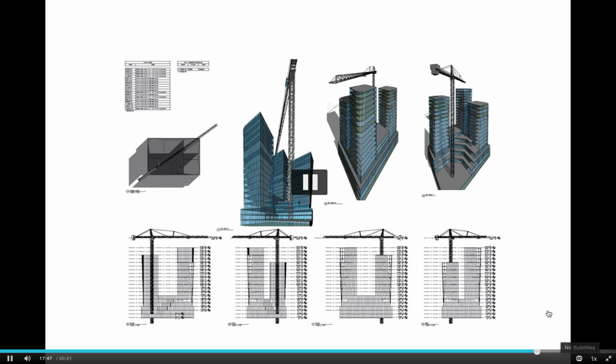And then when the next member is needed, that truck circles around the block and again stops in that lane, under a temporary lane closure. You pick the next piece, and then you reopen the traffic once you're clear and safe. So there's a lot to think about. The construction manager and superintendent will have a very detailed plan as to how this is all happening. And it all has to be coordinated in the field as it goes. So tons of logistics.